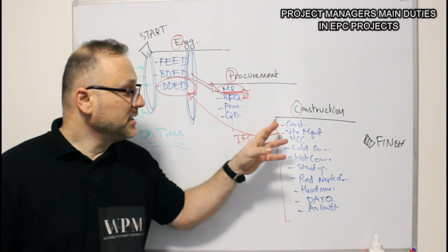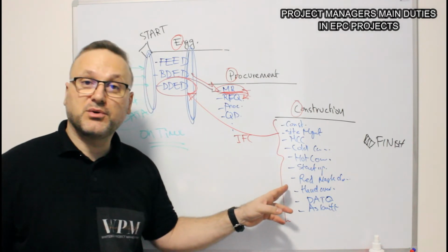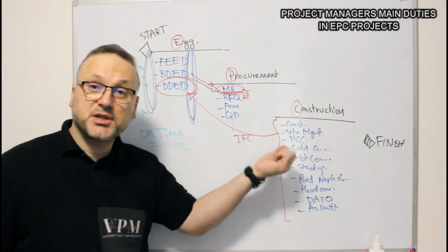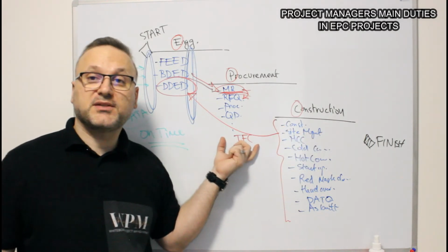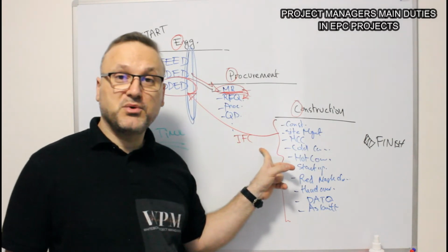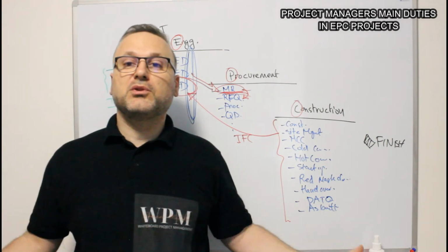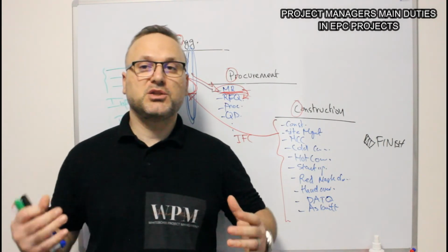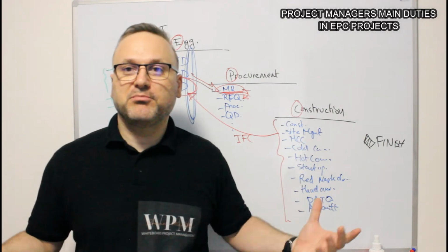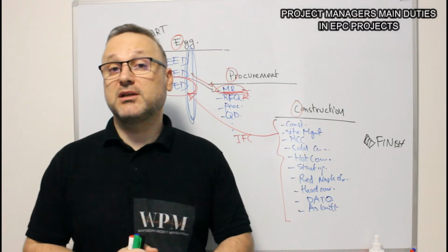Your duty is to ensure that everything is prepared well for your site team. You have a site manager, yes, but if the site manager is there and your team is there and your document is not approved, not issued for construction, that means you could lose everything and you are doing a project with a high risk, because things could change at any time, and then you are losing money.